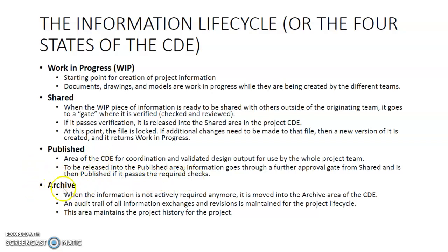There is also an archive state. When the information is not actively required anymore, it is moved into the archive area of the CDE. An audit trail of all information exchanges and revisions is maintained for the project lifecycle. This area maintains the project history for the project.